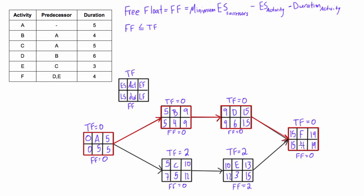But free float has nothing to do with the end date of the project. Free float is the amount of time you can delay an activity without delaying the earliest start of any succeeding activity. For activity E, if we delay it by two days we start on day 12 and end on day 15, and we're not affecting the early start of activity F. That's why activity E has a free float of two — we can delay it by up to two days before affecting the early start of any succeeding activity.